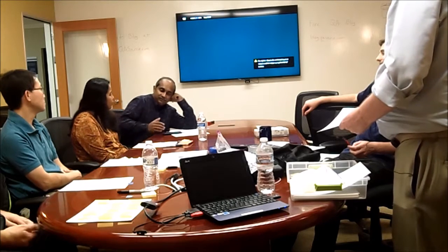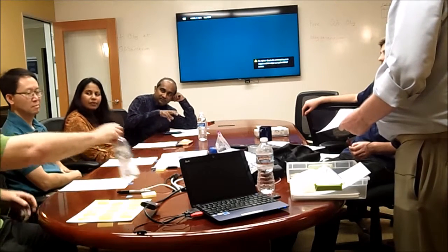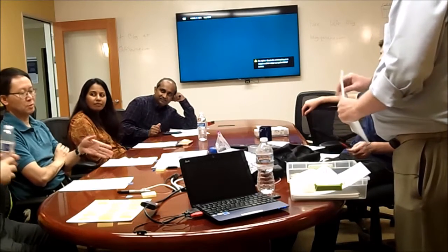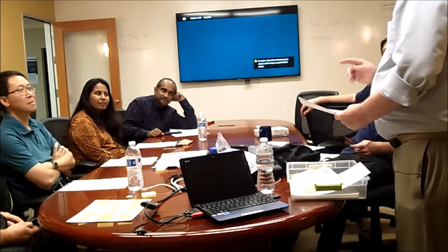So how many would you expect to have done? 12 or less. No, because it's not sequential, there's an overlap, so it's only 6 seconds. There's some overlap because of the bottleneck, okay. So every 6 seconds, there should be units that come through. Okay, fair. Even though each of these takes longer. Those calculations are easier to do when the system becomes stable.